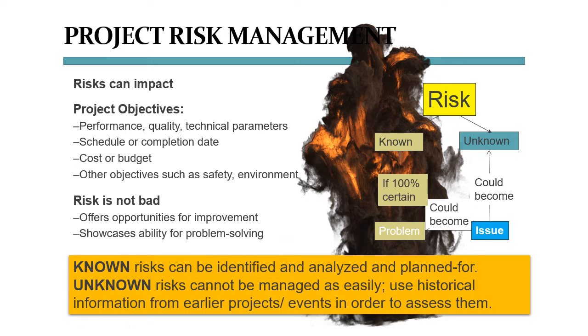The thing is, you can identify, analyze, and prepare for known risks and reduce their probability and impact. How could we have prevented our laptop and file loss from happening? Well, we could have invested in an umbrella or a backpack to keep the laptop dry, or we could have asked a friend with a data plan on their cell phone to come over and help us upload the file to the cloud, or we could have contacted the administrative office and asked for an extension until the rain stopped, or any other creative solution you can come up with.